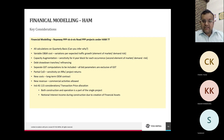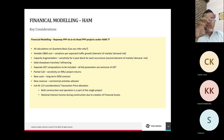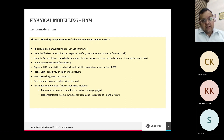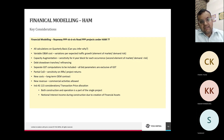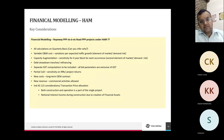Fourth, separate GST computations are needed to track input/output GST accounts. This particularly impacts cash flows during construction, where the developer spends 100% of CAPEX but only receives 60% back from NHLML — so GST on the remaining 40% must also be financed at the project level.